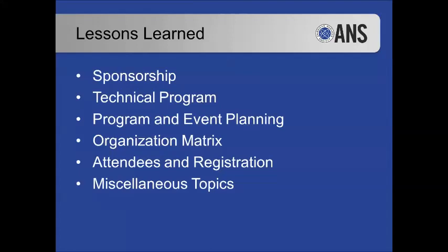The importance of professional attendance comes not only from the job potential and the relationship building that students can do when meeting professionals in their field, but also from their much higher cost of registration. You definitely need those professional attendees, and don't let that slack. It's not just a student conference, even though it is geared towards students. You want about a 2-to-1 ratio if possible, or at least a 3-to-1 ratio of students to professionals, so students are interacting and actually feeling like it's doing something for their career.